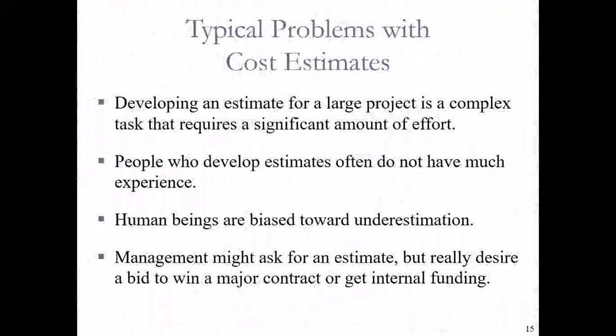Typical problems with cost estimates: developing an estimate for a large project is a complex task that requires a significant amount of effort — you must take it very seriously. People who develop estimates often do not have much experience. Human beings are biased towards underestimation — every time you estimate, you underestimate. Even making a budget at home, you'll be underestimating, not overestimating. Management might ask for an estimate but really desire to win a major contract or secure funding, which causes people to underestimate further.